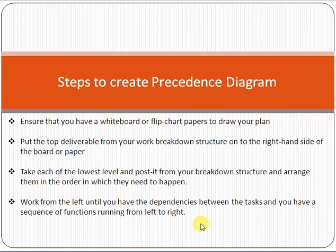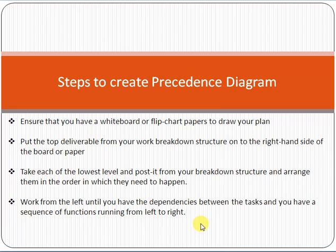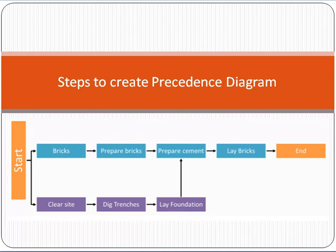In simple terms: identify the activities you have to do, then identify the dependencies among the activities — for example, can activity B start without A, or does B require A to finish first? Then sequence the activities to make a schedule. That is the simple, common approach to creating a Precedence Diagramming Method. Let me give you a very simple example. Starting from the beginning, the activities are: prepare bricks, prepare cement, and lay bricks — these are activities done in sequence.